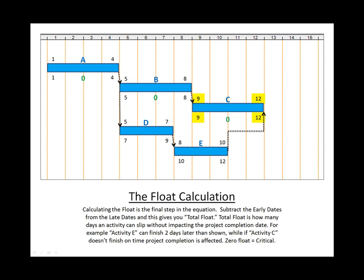If we look at D, you'll notice that the early dates and the late dates are different. If we subtract the early dates from the late dates, we get two days of total float. Same with activity E. If we take the early away from the late, we end up with two days. Zero equals critical, so that means activities A, B, and C are our critical path.